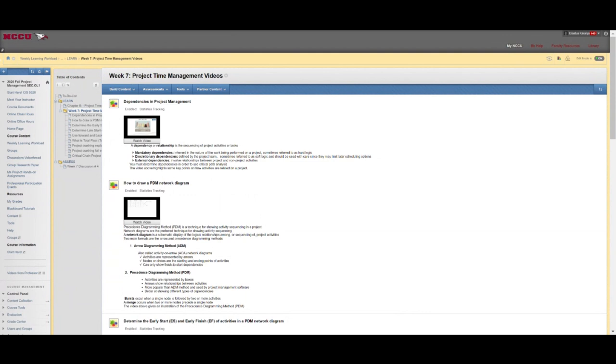And now what you do is at each of those work breakdown structure elements, what you call the work unit, you assign a time and you say this work unit is going to take 2 hours, or it's going to take 5 days, or it's going to take a month to finish. And then what you do is you put all those work units together, and you determine the project duration.